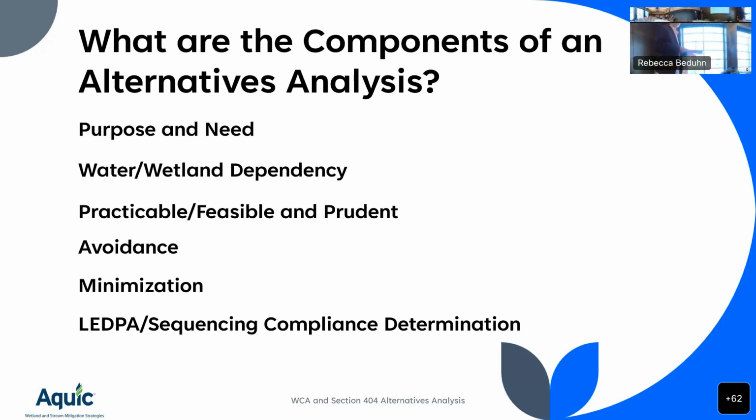The 404(b)(1) guidelines are pass/fail, like you pass it or you fail it. So that's what we're working toward, the LEDPA. That's why the word practicable is up there. Feasible and prudent for WACA. A lot of overlap there in what they mean. So alternatives encompasses offsite alternatives and onsite, what we call onsite configurations or avoidance and minimization.